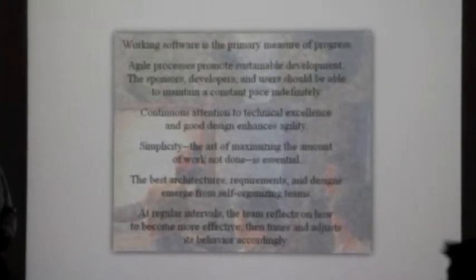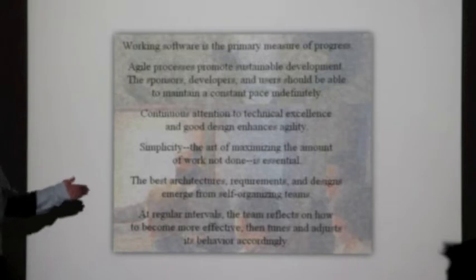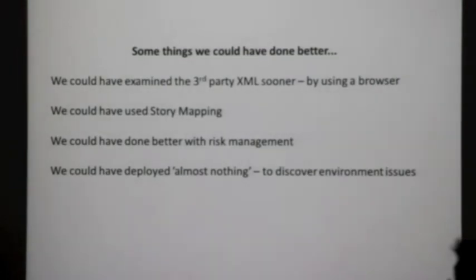We would rather say, okay, maybe there's 10 stories left, we're doing 3 a sprint. That means, should have said 9, there's 3 sprints, or maybe 3.5 sprints left. The velocity was per story more than points. Some things we could have done better.